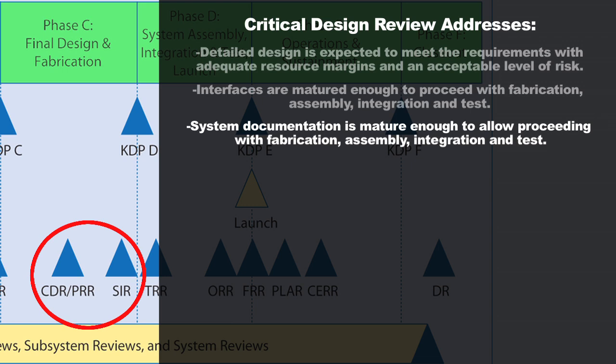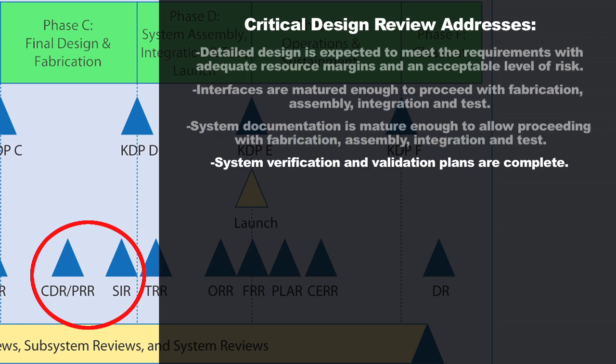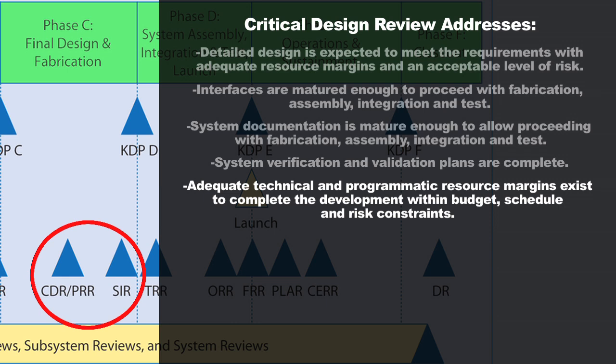The review team will make sure system documentation is mature enough to allow proceeding with fabrication, assembly, integration, and test — checking that all test plans and procedures are identified and the integration process is well-defined. They'll also verify that system verification and validation plans are complete down to the lower levels, ensuring you can verify and validate components through the subsystems and up to the full system as you start to build up the spacecraft in the next phase. They'll look for adequate technical and programmatic resource margins to confirm you can complete the development within budget and schedule without asking for more funds or missing your launch date.